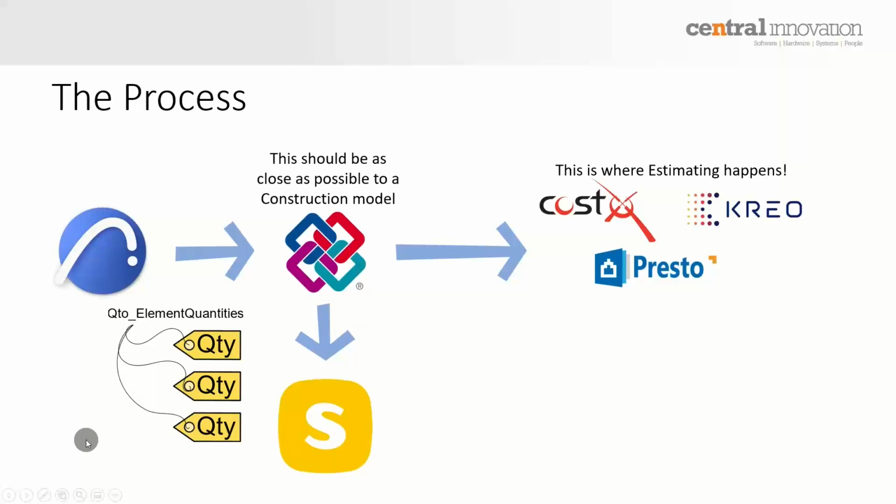So including those is not a bad idea, and it will offer the estimating process an advantage because they can read some pieces of information, typically values like areas and exposed surfaces, thicknesses of specific elements that may or may not be included in the geometry, for the use of that specific software. So there might be quantities here that you may want to transfer that may not necessarily be easily measurable from the IFC. So we're going to take a look at that.